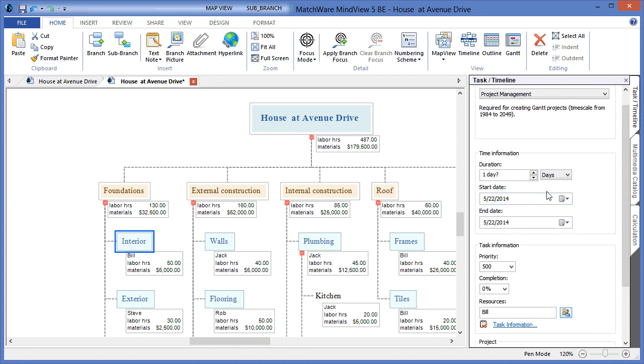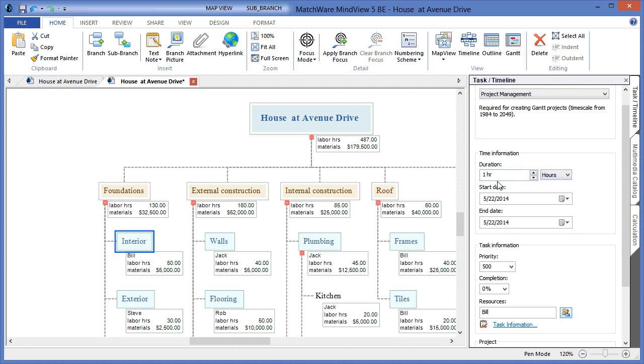I can choose to designate a duration in any metric that I determine, and if our estimation of time is correct, this particular task will take Bill 50 hours to complete. By entering that information into the dialog, you can see that the corresponding end date is automatically calculated.